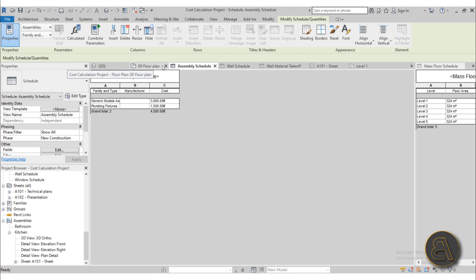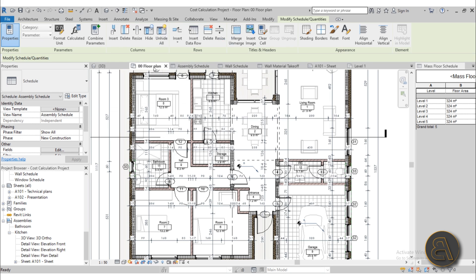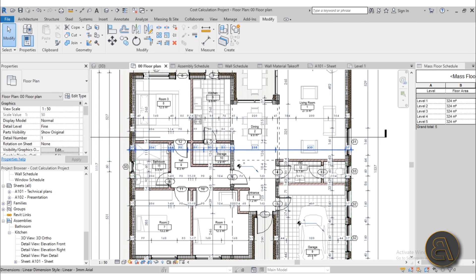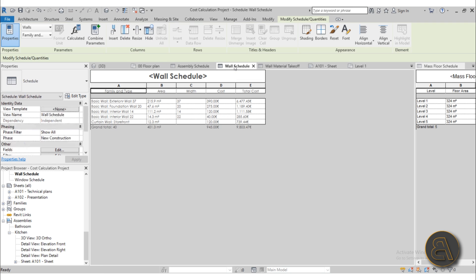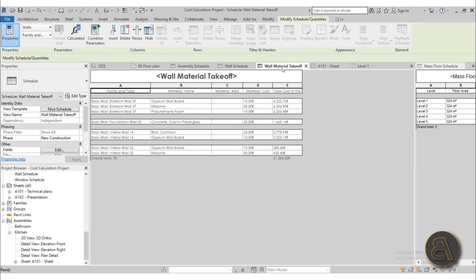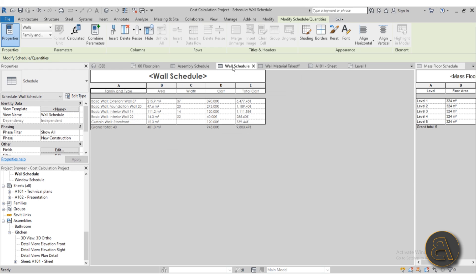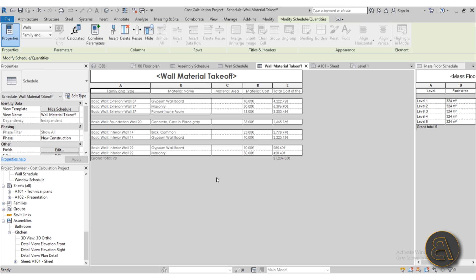Also I talk about two approaches to calculating the cost of the building, in this case walls. So for walls I show you the wall schedule as well as the wall material takeoffs. For the wall schedule you're basically using the price for constructing the square area or for constructing an area of a certain wall, and for material takeoffs you're actually dividing walls into all of your materials.